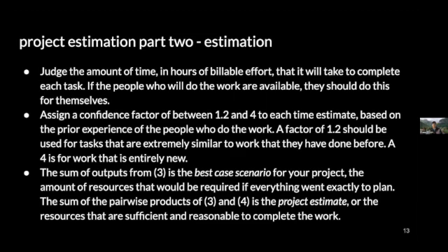If the project went exactly to your expectations, then that is the amount of time that it would take you, because it's time and billable hours, and because personnel costs dominate, in almost all cases, the total project cost for software development efforts. That basically defines your lower limit for project feasibility.